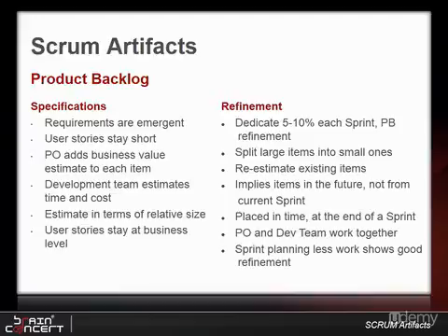Fifth, Scrum does not define techniques for expressing or prioritizing items in the product backlog, and it does not define an estimation technique. A common technique is to estimate in terms of relative size, factoring in effort, complexity, and uncertainty, using a unit of story points or simple points.